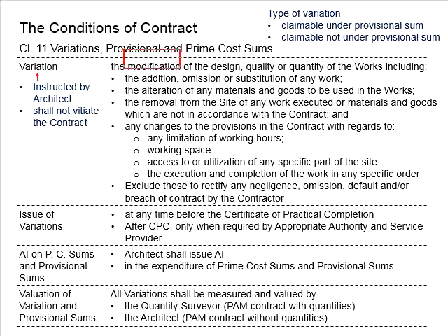And these modifications, which the contractor is entitled to as variations, do not include those that are to be carried out in order to rectify any negligence, omissions, default, or breach of the contract by the contractor. In other words, if the problem is caused by the contractor, whichever rectification work cannot be considered under the variations. The cost will have to be fully paid by the contractor, and the contractor is not entitled to claim for the cost. This should have been prevented if the contractor is competent and vigilant enough.